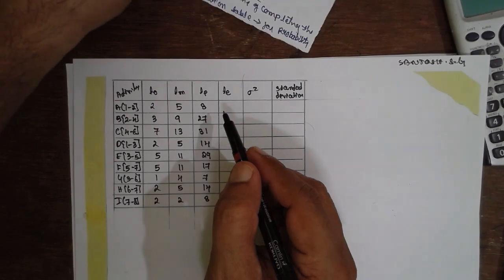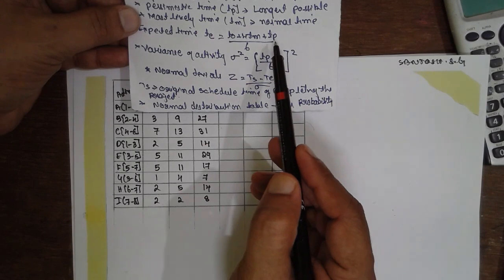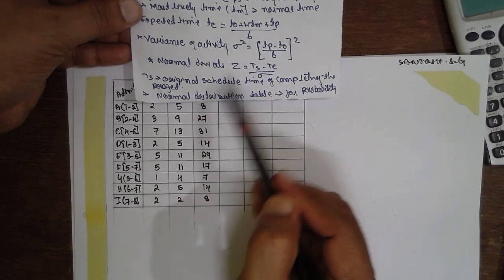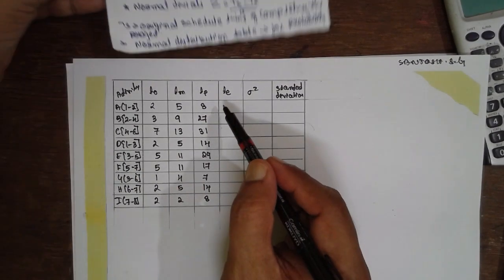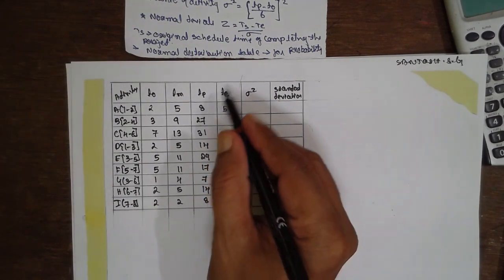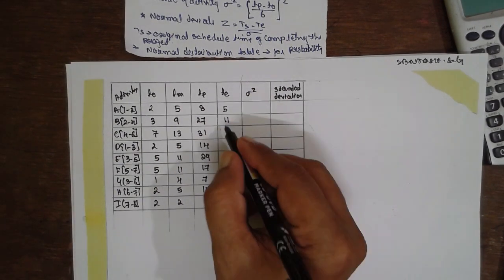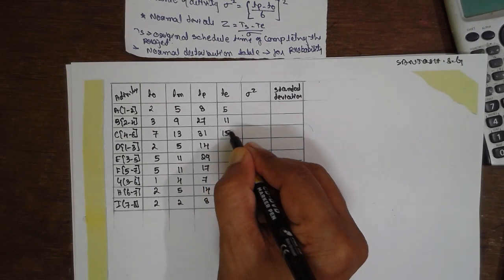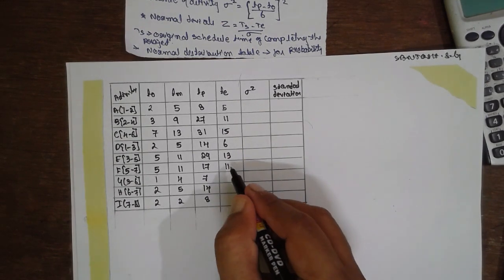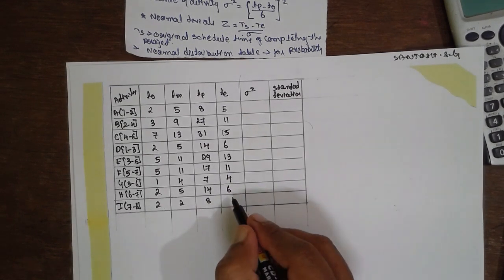How to obtain the expected duration: using the formula Te = (T0 + 4Tm + Tp) / 6. For activity A: (2 + 4×5 + 8) / 6 = 5. The expected time values for all activities are: 5, 11, 15, 6, 13, 11, 4, 6, 3.